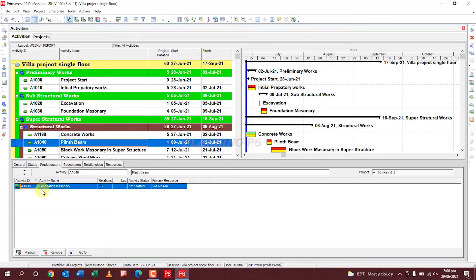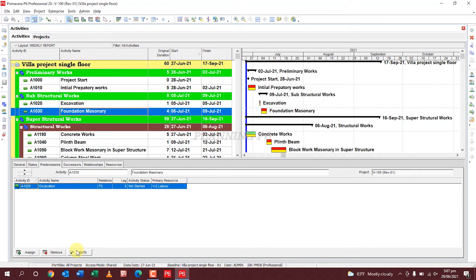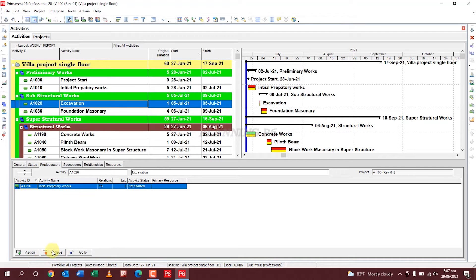In the Predecessor tab, you can see the predecessor of the selected activity and remove or assign predecessors from here. If you want to navigate to the predecessor activity, click 'Go To' — and you can keep clicking 'Go To' to navigate further up the predecessor chain.